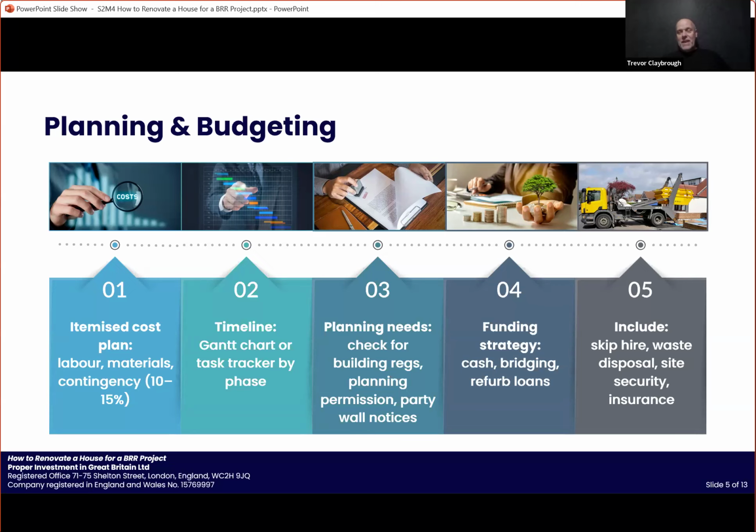When it gets to the bigger projects, the contractors doing those projects expect there to be a contract in place, and the lenders on those projects will also require contracts with the builders, and will check those contracts. On a smallish BRR project, for example 20,000 or maybe 30,000, using bridging, the bridging lender will want to see the quotes, and probably a contract from the builder. But as long as it's a standard 5 or 6 page contract that covers the basics such as warranty and the main points, the lender is going to be happy with that.